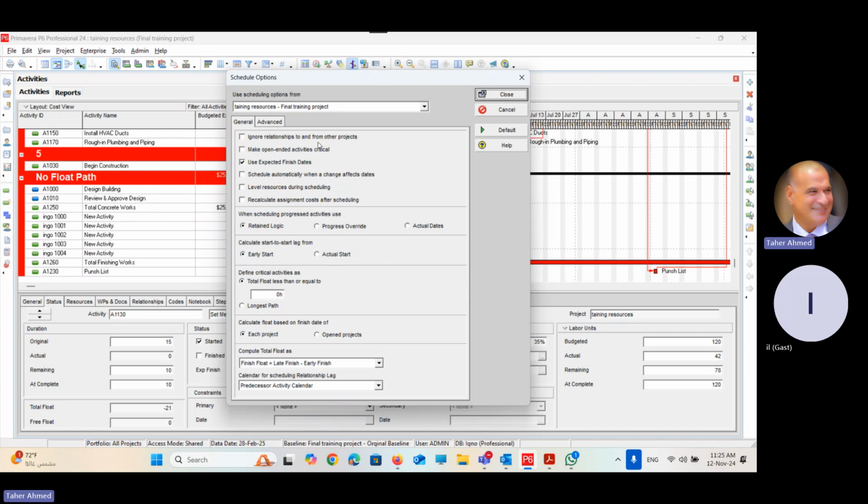In some cases, if you are the program manager, you can connect more than one project together, saying that I will start excavation in my project after completing the excavation in the previous project, project ABC. So ABC will complete the excavation first, then we will go to my project and start the excavation on it. This is what we call external relationship.